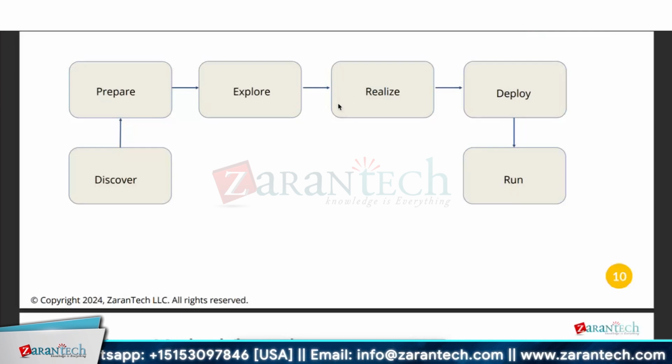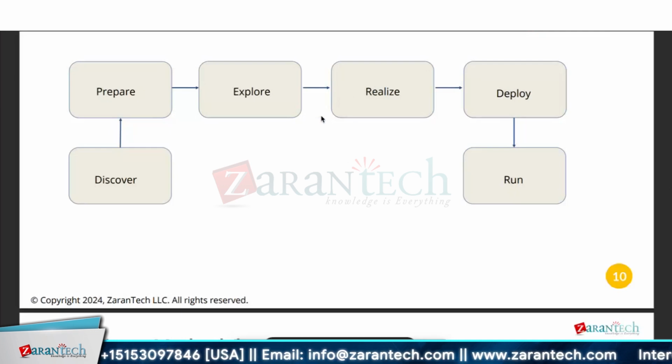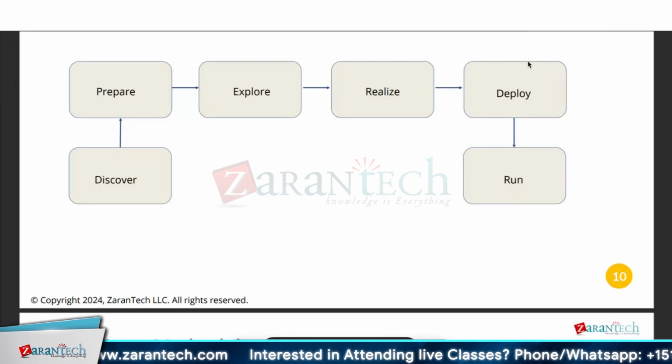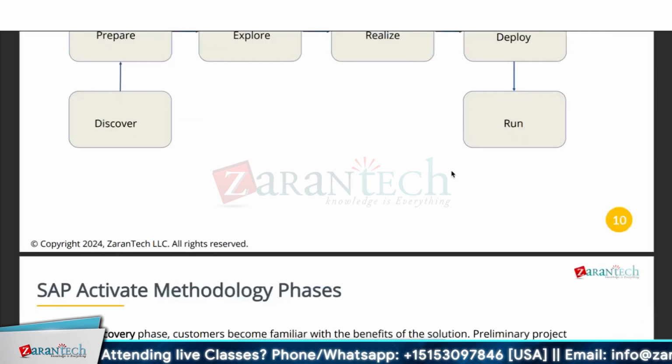Okay. Once we are done with all that integrity, we will integrate finance to the different modules wherever required. For example, SD, PP, MM, we have the standard integrations, right? That also, if needed, we will do as part of the realization phase, and we will start testing that before deploying. In the activate methodology, there is no testing bracket kept separately here. So it will be covered in the realization only, or sometimes in the deployment phase before pre-testing.